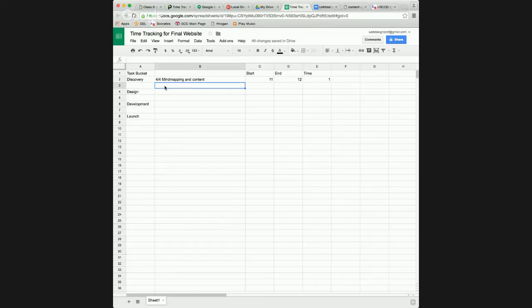I want you to be able to tell me how long it takes you to set up WordPress on a new server. It should be 5 minutes, right? Just install WordPress. That's it. People pay me to do this all the time. Go log into the hosting service like SiteGround and install a new WordPress. You're saying, I want it in this folder, you're adding a username and password, you're emailing that to yourself, you're setting up the admin file. On someone else's computer, if it's for a client, yeah. So I want you to keep track of how long these tasks take you so that you can estimate them.